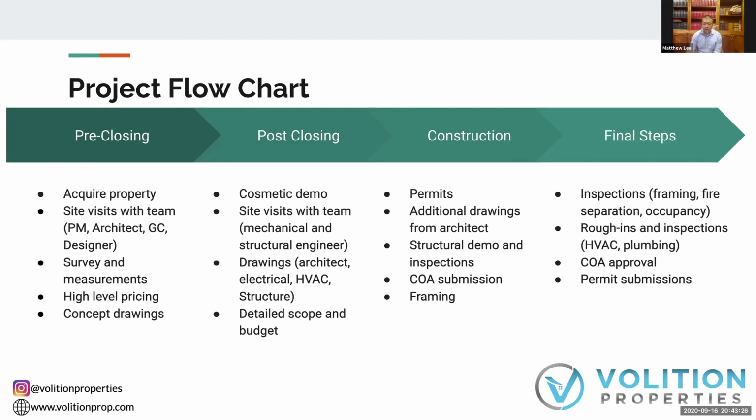Yeah, so basically, if you buy a house and say, I want to build 4 units, the City of Toronto will say, awesome. Here's your development charge. Here's your educational fee. Here's, I can't remember all the names of the levies. So thank you, please write us a check for $100,000, right? And these are absolutely good fees, but they're not meant for what we're doing. If you're building a condo, yes, there are development charges because a condo puts a huge new strain on the area. Those development fees need to be pulled together because